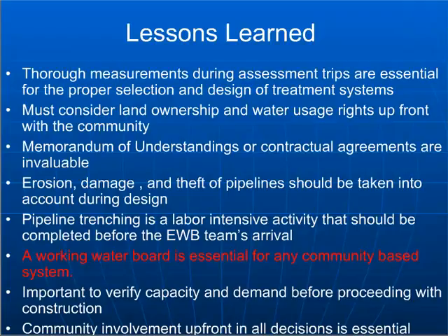Then you're going to devote your time to developing a complete design and getting complete approval for the project, and then going through the implementation steps. So it's definitely not an assess, design, implement type process. It often requires more back and forth with the community through multiple assessment trips.